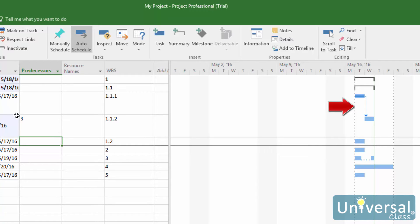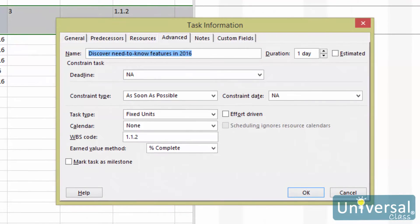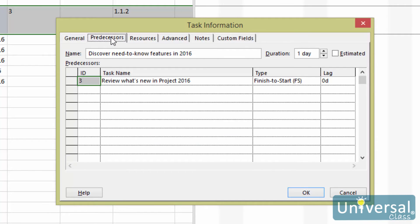There is also an arrow showing the relationship between the tasks in the chart area of the Gantt chart view. You can also create dependencies in the Task Information dialog box, or use this box to modify a relationship between tasks. To do this, double-click the name of the successor task so the dialog box appears. Click on the Predecessors tab. In the ID field, you can type in the ID number for the predecessor task. The task name and the default finish-to-start dependency type are entered for you automatically.